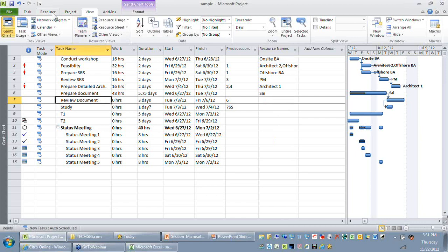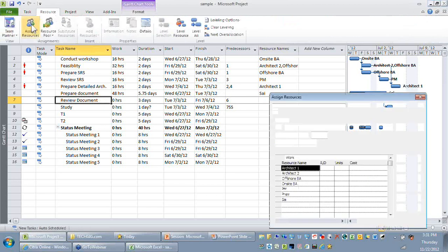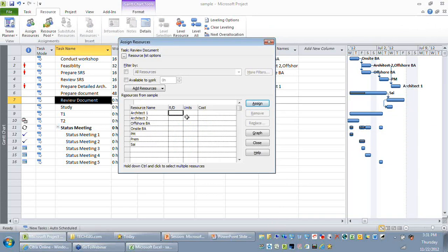You are able to find there is an R bar D column. R bar D stands for request or demand. This is something connected with the resource substitution wizard, which was asked by one of the participants. So remember, only if you have a server setup, naturally when you are using a desktop version of Microsoft Project, what happens is the copy of the global.mpt, that is a template file stored in your local machine, is getting copied to create a plan.